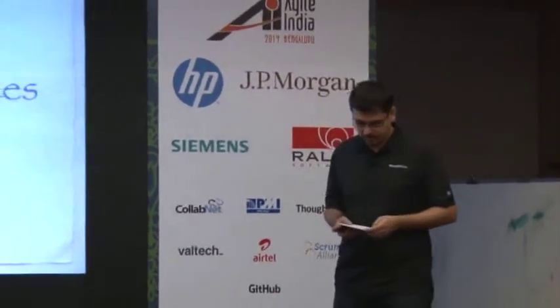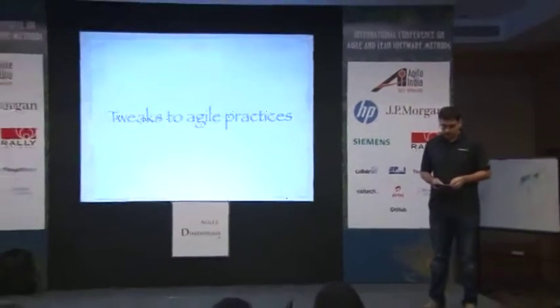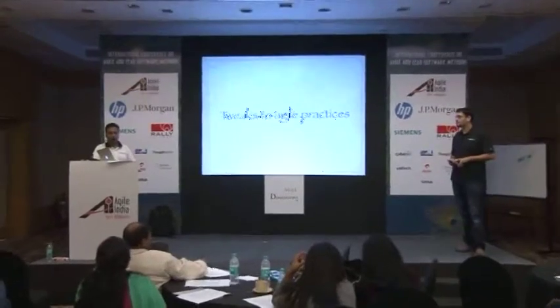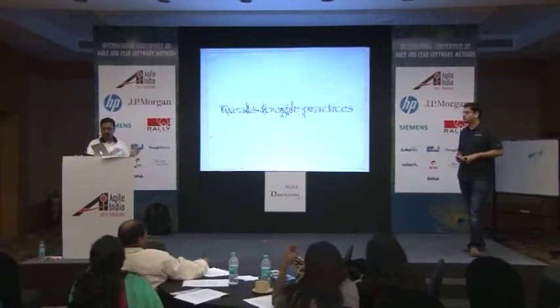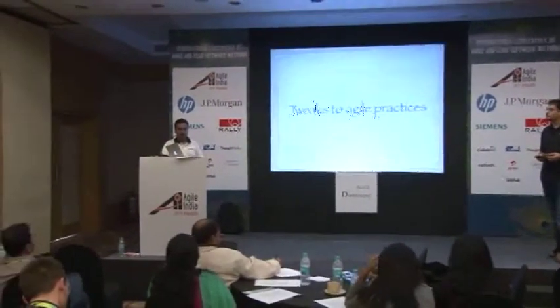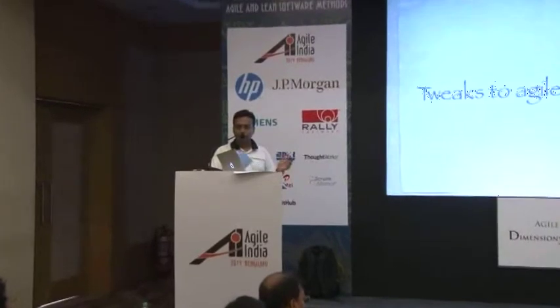And coming back to a question that one of you asked earlier, when you have a distributed team, you will have to tweak your practices, whether it's stand-ups or retrospectives or planning meetings, a little bit to account for the fact that you have people in both locations. So, for example, in retrospectives, it would mean using web-based tools that allow people to look at points being put up by both sides, having video on both sides, having facilitators on both sides who've earlier met up and synced up notes about what structure is going to be followed and so on.